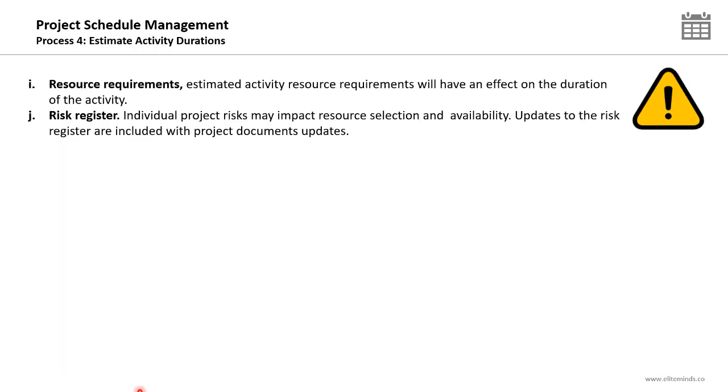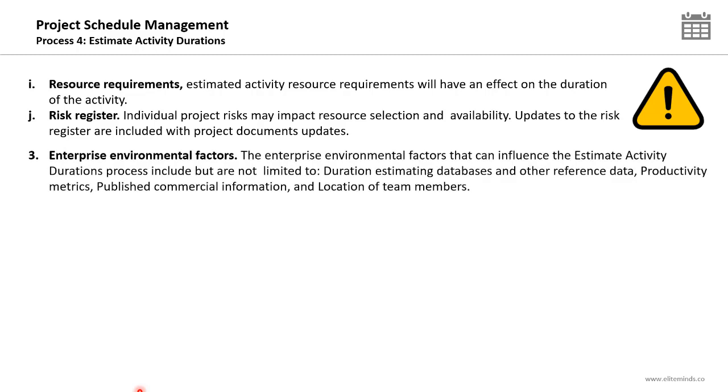Another two project documents are the resource requirements. Estimated activity resource requirements will have an effect on the duration of the activity, and the risk register, if there are any risks or overall project risk that might influence the duration estimates of the project activities.